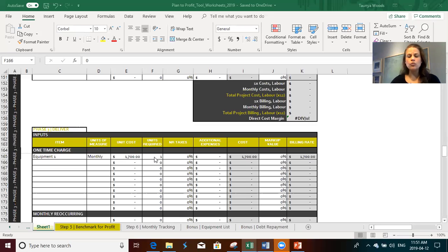And then every week you come back to it, and it's like, you know what, that proposal actually took 45. So then you ask them, well, next time, is it going to be 45? Do you budget for 45 or do you budget for 30? Nobody's ever doing this math, and this is why we lose so much money every year.